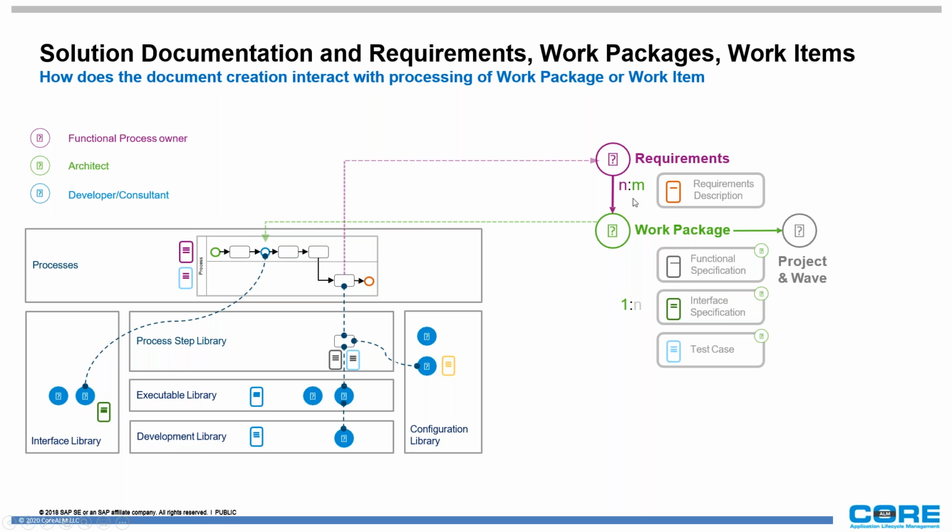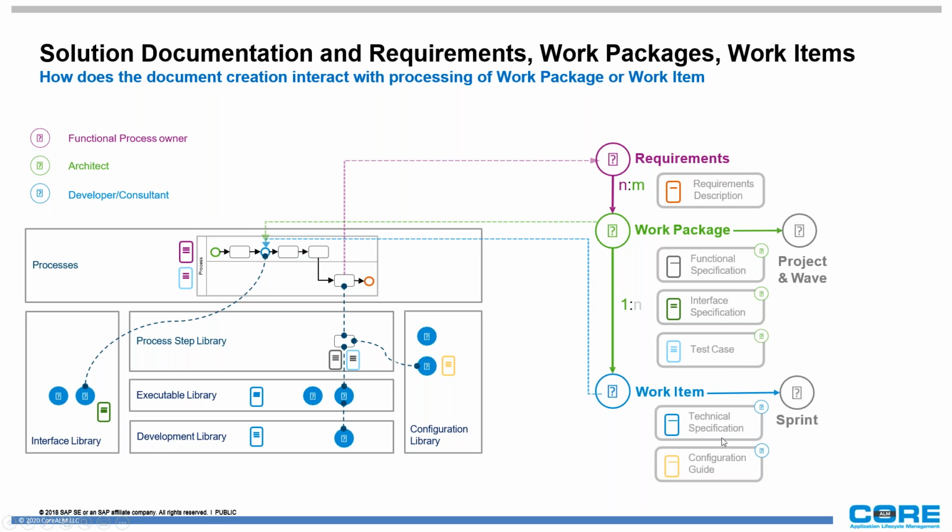In this case, the requirement can have one or many work packages. So you could have many work packages to a requirement. The work package should contain some deliverables, like functional specs, interfaces, and test cases.